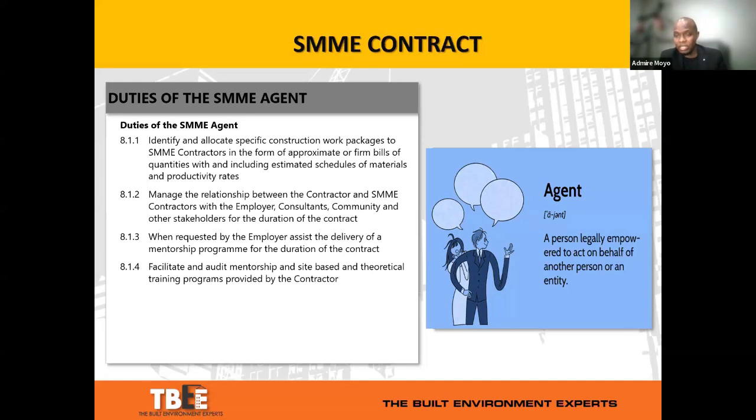And that's your expectation, that they must lay at least 700 bricks. Don't leave it as something that is part of some form of guesswork, because that's the only way you can then hold the SMME accountable, or transfer that skill so that the SMME understands that, well, as a bricklayer, if I'm engaging my bricklaying team, this is the expectation per day.